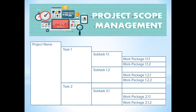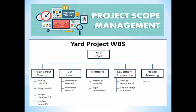Here is an example of a WBS, or work breakdown structure. We have the yard project WBS. As you can see, there are five main tasks in the yard project, and each has subtasks, which makes the project run smoothly because you know what to do for each task.